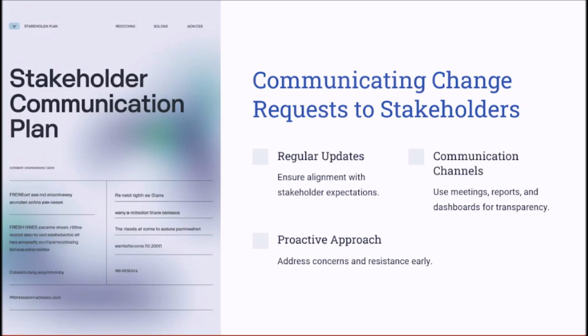So, the stakeholders must understand the change control process. You need to make them aware that not all of the change requests might be approved; they might be approved or rejected based on the change control board's decisions. For example, in a government infrastructure project, if a road design changes due to environmental regulations, early communication with the affected communities helps manage the expectations and reduce the resistance.